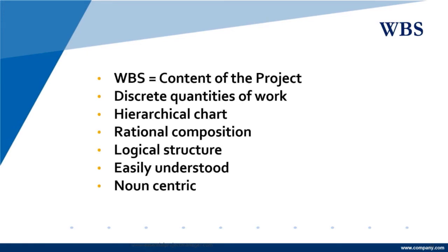Noun-centric. Okay. What does noun-centric mean? Noun-centric, that means we want the stuff that you're doing. These represent deliverables. Deliverables are not actions. Let me say that again. Deliverables are not actions.